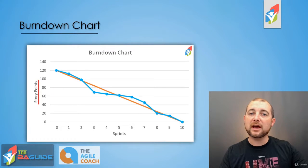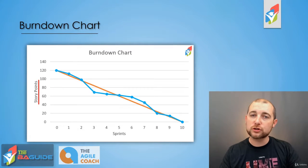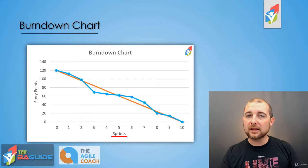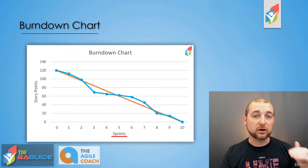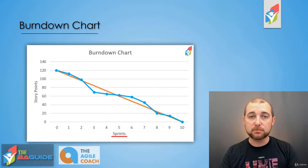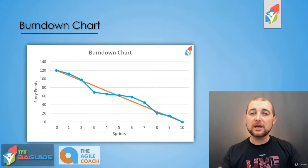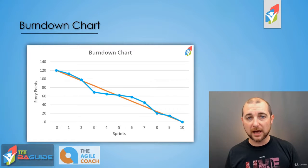On the vertical axis, we have our work — our story points. On the horizontal axis, we have our time — our sprints. In the middle, we have two lines.